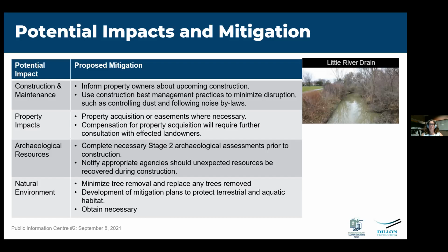Yeah, so stormwater management facilities will eventually be city-owned facilities, and the city will need to acquire the property to accommodate those facilities. The other components are proposed roadways, which the city would also eventually need to own. This study is not providing the city the approval to obtain the roadways, but for the East Pelton and County Road 42 secondary plan areas, the property acquisition areas that we're identifying will allow the city to proceed with the necessary coordination with property owners for that land acquisition. So that's what I just wanted to make sure I understood, that there will be discussions addressing compensation for the property, which is good to hear, if that's the final outcome.